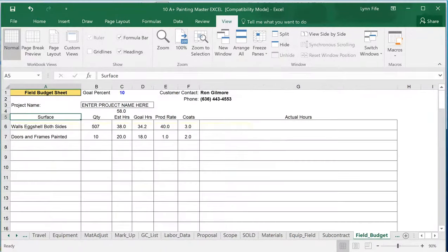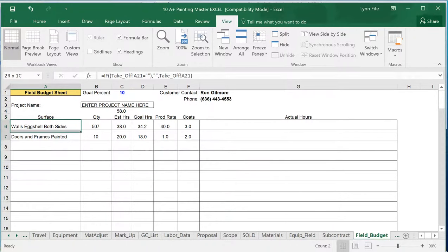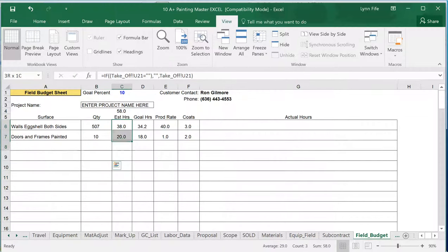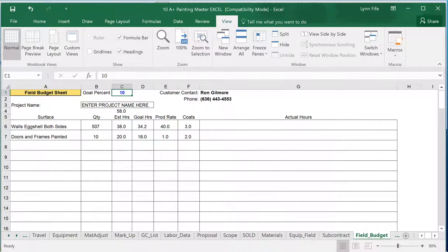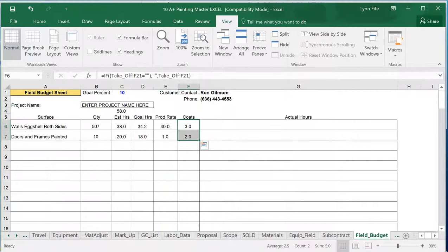If you don't use field subcontractors, then you can use your own employees. This is a field budget sheet intended to give to your painters in the field. That will show them a list of everything that's included, how much of that they're supposed to do, the estimated hours, and you want it to beat it by a certain percentage, beat it by 10%. Here's your goal hours, and here's the production rate that you're expected to do along with how many coats.